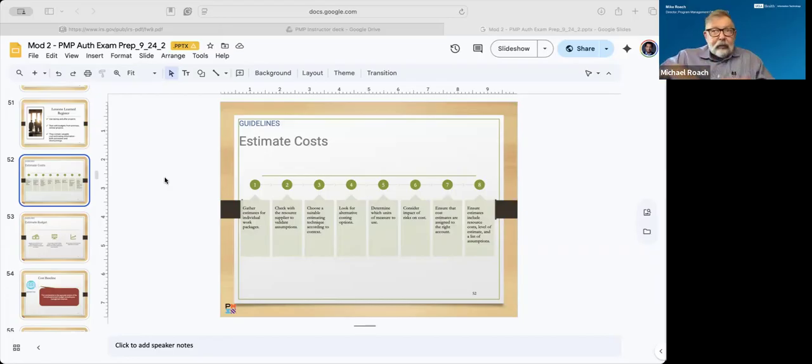And when you're doing these really large multi-billion-dollar projects, any day you're having people on site without materials for them to work with, you're costing an enormous amount of money. So you have multiple ways that you can get those materials in to keep your construction moving.